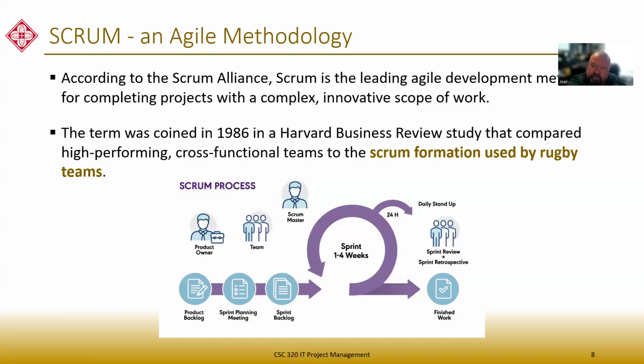Now, my project manager is responsible for that entire list and then deciding and helping the teams decide what we're going to have available for my sprint activity. So I'm going to build a sprint backlog based off of some subset of my product backlog. The items in the sprint backlog are all related together and doable within a short period of time.